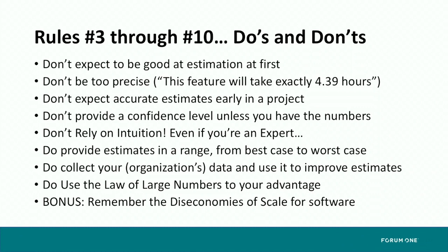So if I can characterize that, I think the question is, should you characterize estimates with a risk level? Yeah. And I would say yes, maybe, but a range is probably an efficient way, and maybe a more efficient way than identifying what that risk is. So to identify, and I'll talk about this in a couple of slides, to identify a worst case is really to say, I think it's going to be this, but there's a risk of 200% additional cost. So that is one way to absorb risk into an estimate.